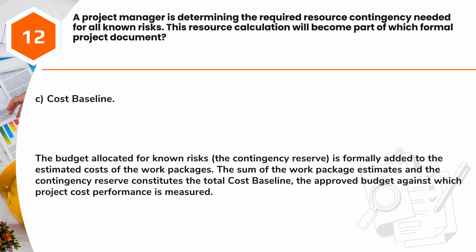Answer: C. Cost baseline. The budget allocated for known risks, the contingency reserve, is formally added to the estimated costs of the work packages. The sum of the work package estimates and the contingency reserve constitutes the total cost baseline, the approved budget against which project cost performance is measured.